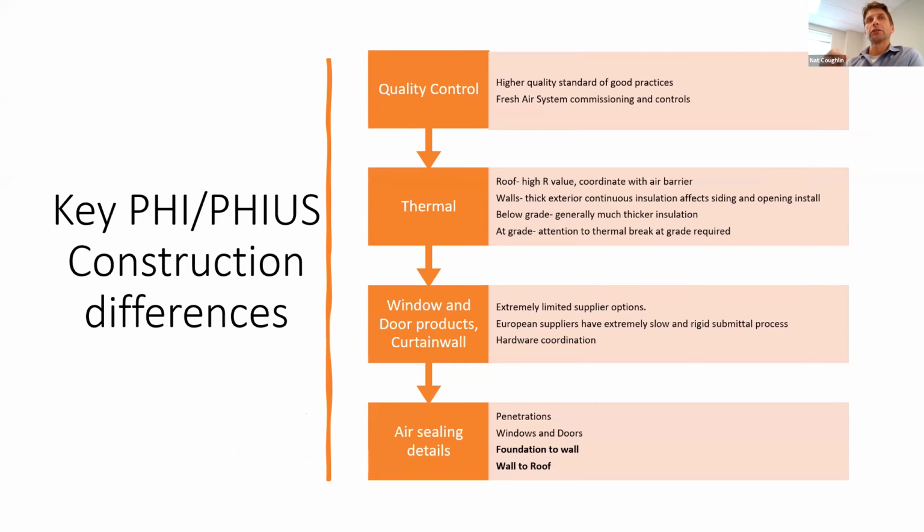I will say on quality control too, I have learned through the two projects that we're doing that understanding and really focusing as a general contractor on the commissioning and the controls of those HVAC systems can matter because it's not just what we did 5 years ago. There is a level of complexity that is not always easy to understand. And we found that there was a lot learned at the end of the job with just making sure the owners understood what they had on their hands.